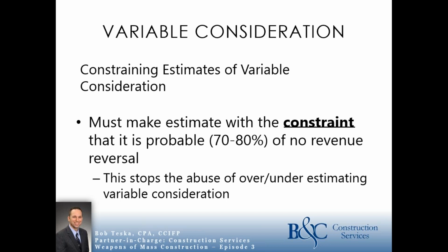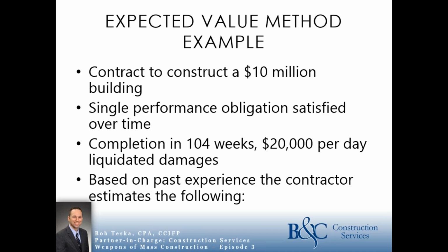Remember, the overall idea from this new revenue recognition model is you're going to recognize revenue in amounts that you expect to receive throughout the life of the contract. So if it's likely that you're going to have liquidated damages in the contract, you should record that essentially as part of the contract to begin with and really decrease the revenue recognized over the life of the contract. Like I said, there are some examples we'll get into that will hopefully make this a little more understandable.